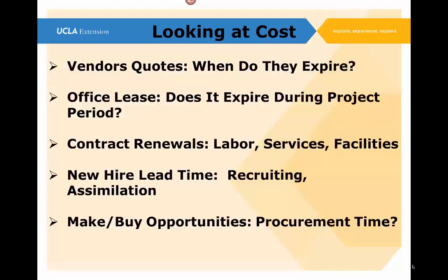Also, when we look at costs, what about make-buy opportunities? Not sure how familiar you are with make-buy opportunities, but sometimes we have an opportunity. We can buy services within the company. In other words, we can go to a software group and ask if they have a couple of software developers or designers or coders that we can use on our team.